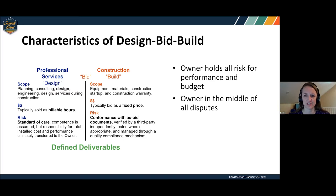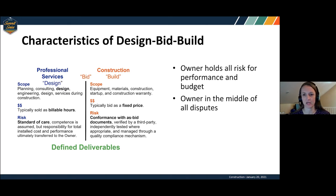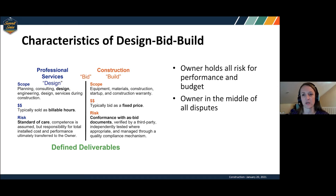So, characteristics of design-build. The characteristics of the model is that the designer is working towards a standard of care, and then you're paying a contractor to build what has been designed — what's on the plans and specs — and so they're responsible for conformance with the as-bid documents. And what that leaves is the owner really in the middle, with a continued responsibility to hold all risks for performance and budget, and they are in the middle of those disputes.